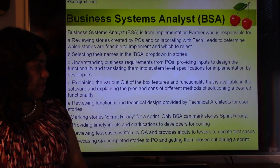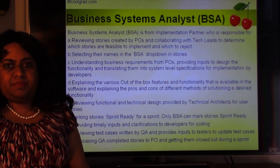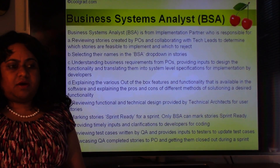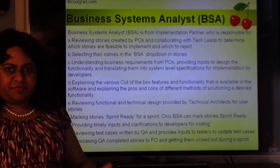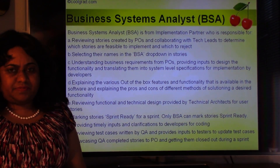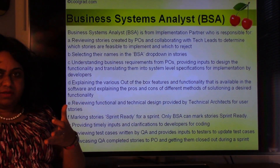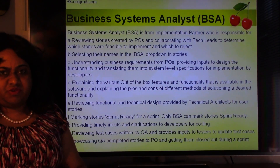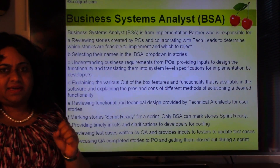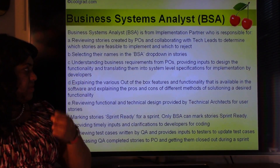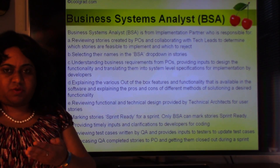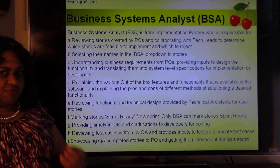The Business Systems Analyst or BSA may be from the client or from the implementation partner. The BSA is responsible for reviewing the stories created by the product owners, deciding which stories are doable and which are not. For feasible stories, they take them up; others are rejected by consensus. The BSA populates their name in the user story as the BSA in charge, understands the product owner's business requirements, provides inputs to design the functionality, and translates the business requirements into system-level specifications for implementation by the developers.